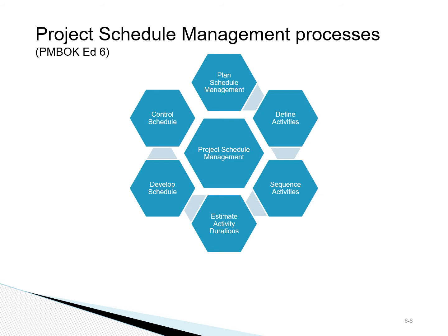We need to sequence those activities in a logical and optimal way. We need to estimate each activity's duration and then combine all that information to develop a project schedule. You use the baseline schedule from then on to control execution of all the subsequent activities.